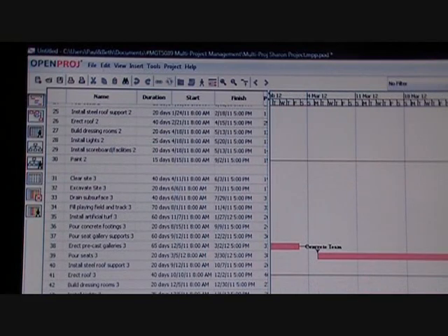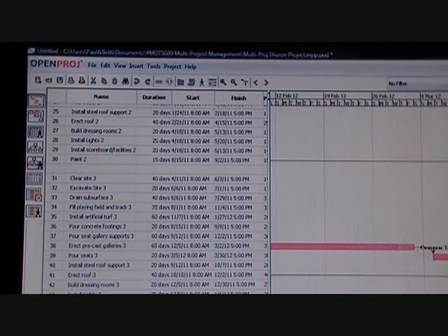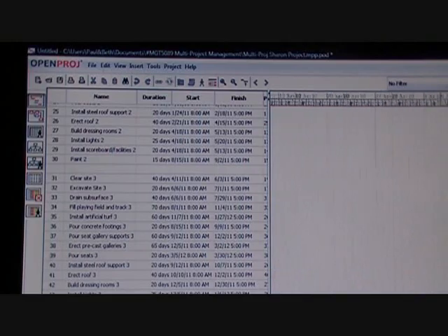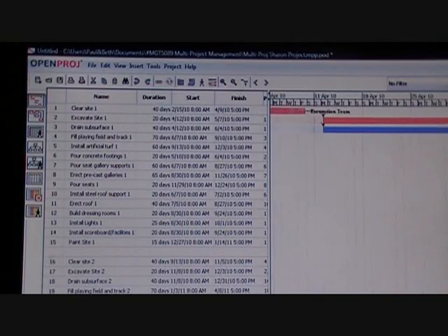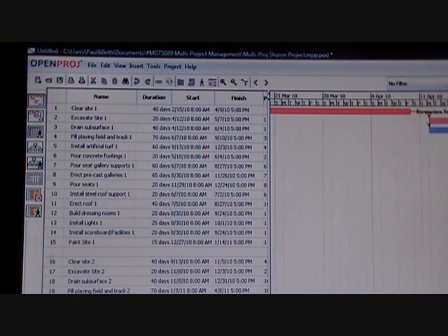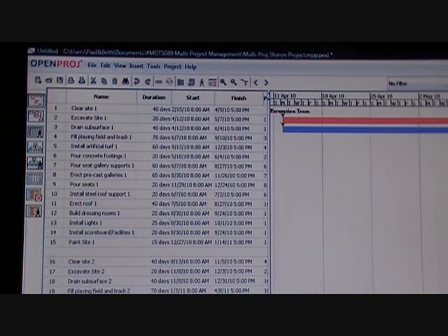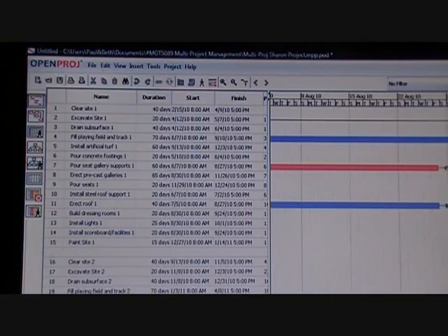You can also see that the second and third project, because there's overlap, do not take quite as much time as the first project. You can see that by looking at the total duration of the entire project plan. In addition, the red bars show the critical path, not just of individual projects, but what the critical path is to get all three done.